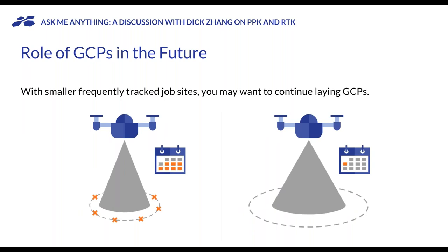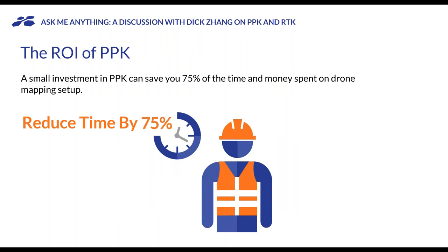Even with PPK, GCPs are not completely irrelevant. If you're mapping very small job sites over a long period of time, laying GCPs once makes sense — the time cost spreads out over years of data collection. But the more you're doing one-offs or areas tracked once a month, once a quarter, or once a year, you'll see dramatic time savings using PPK. You may still need some GCPs depending on accuracy requirements, but you can cut down from 10 or 8 down to often just one GCP — way less time, much easier to manage.